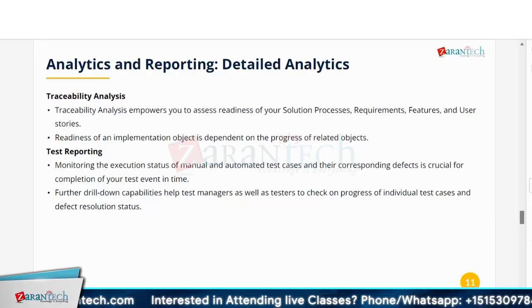So this all comes from that historical data, right? You can see what the issue was last wave or last sprint. Okay, for this module we had more test cases, so we had to assign more people, and the people who were assigned were not very familiar. So we need someone with that module background who has worked on testing in this module or domain, right? That can come from your historical data, your historical reports, right? But for this you also have to maintain everything in place, right?